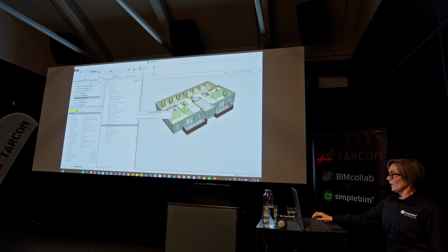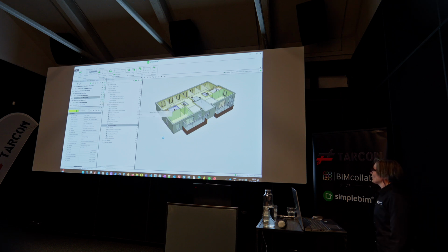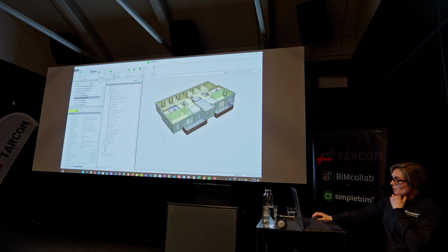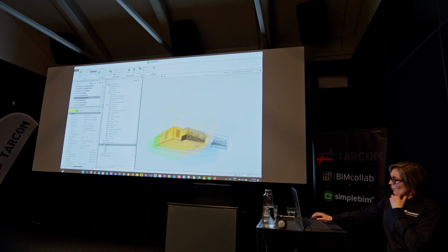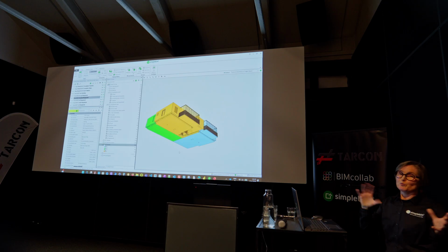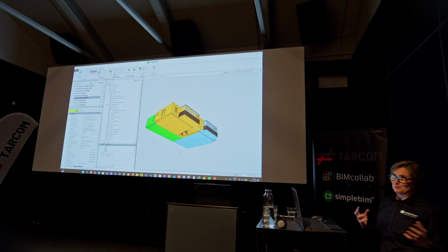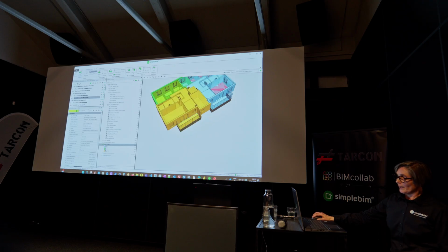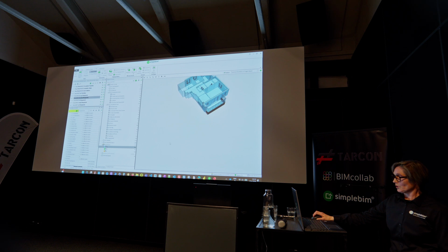Okay, schedule management, let's take that on. And I added locations to this. Here we have it. Now I can standardize everything else, but not the shape and location of the prisms. But everything else, now it's split the floor, and now I can get all the quantities by, for example, section.